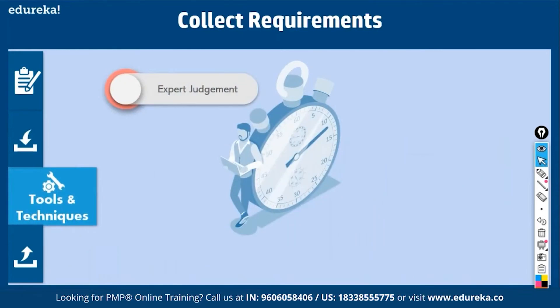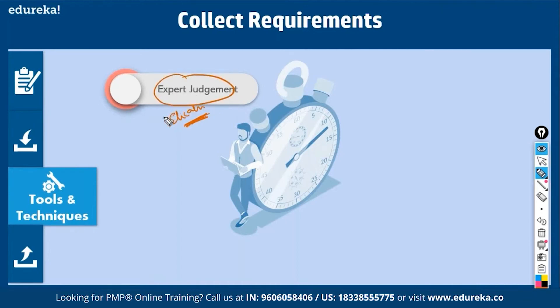Tools and techniques for collecting requirements include expert judgment. You need to employ business analysts who have specialized knowledge in requirement elicitation, documenting, business knowledge, and diagramming skills like drawing use cases and context diagrams. They also need expertise in conducting facilitated sessions and interviews with stakeholders. As a project manager, you have to make sure this expert judgment is brought into the project, either from within the same project or from another.